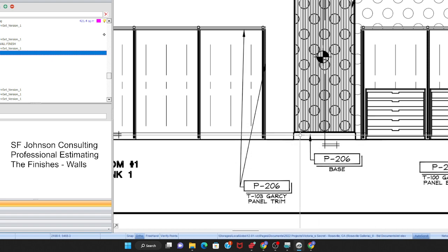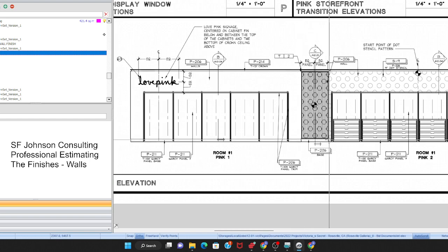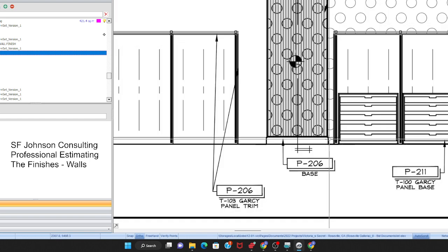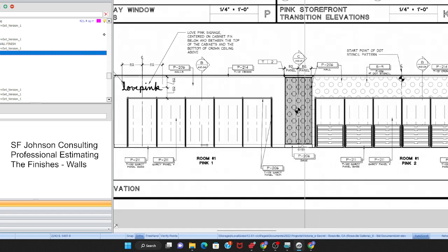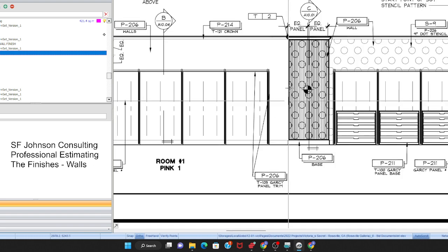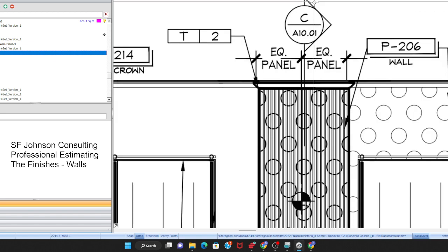And see, in something like this, is this a column that has a vertical in, like is it going in and we can't see it type of thing? So, you want to give a little extra percentage, maybe 10% above for this type of stuff that is not shown in great detail. Oh, there is a section view. There's a section view.